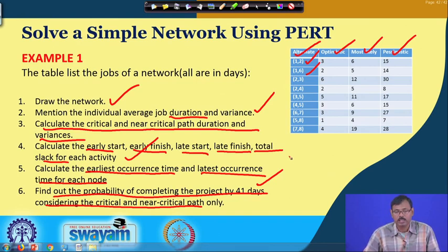In the last class also we discussed that you need to go for the complete analysis of the network, a bigger probabilistic approach, if you are considering all uncertainties attributed to all the jobs, and that leads to uncertainty on the completion of the project, because interdependencies are there. That is why it forms a more complex network or more complex statistical analysis for calculation of the probability of completion of the project.